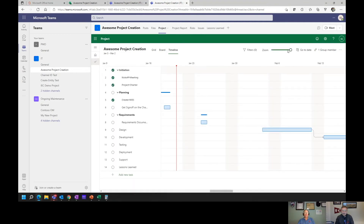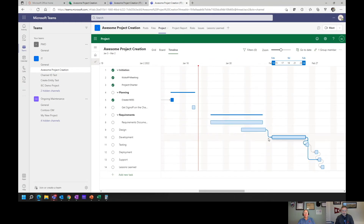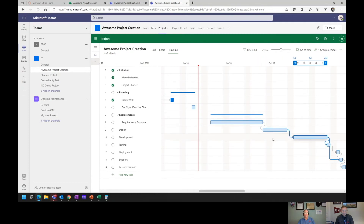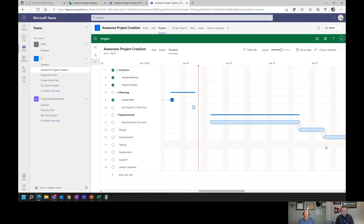I also have a timeline — this is like a Gantt chart. I can zoom in and out and create relationships between tasks by dragging and dropping with my mouse. Notice how that kicked it out — now I have a finish-to-start relationship on these two tasks. As this task gets extended, my critical path just pushed out. That's important, because if you're using Planner or Excel to do that, the project is not going to push out for you — you'll have to figure that out yourself.